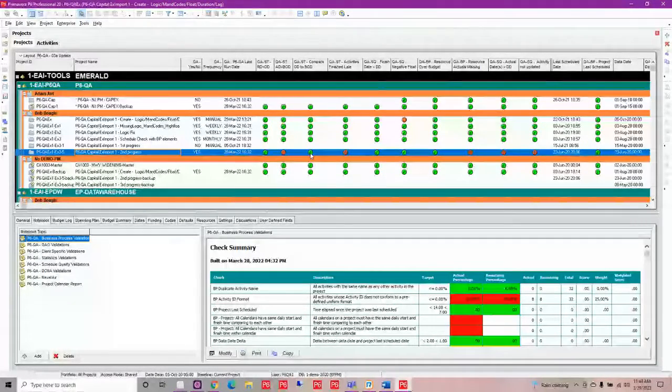Of course, we have our original duration compared to our baseline duration. How are they comparing? Are they lining up? Are they not lining up? Activities that are finishing late, let's flag those. Let's see which ones are finishing late. I might also be concerned about my finish date being after my data date. Now, again, this might be okay, but they may have said they're going to finish it this week, and so this is okay if this is red.